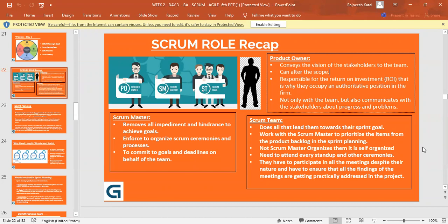Exactly. So as a development team member, you and me cannot just go and say no. Definitely not. What I've always mentioned about the development team, whatever the customer asks, if we feel it will require more time or more bandwidth, we will always have to tell them we will get back to you after checking with my seniors or my team. But in case of the product owner, definitely if there are some important things, he'll have an internal discussion with the team, with the Scrum Master, with senior management. But then he has the right. He is the person who can say yes and no to the customer, to the stakeholders. Does this clear your doubt?